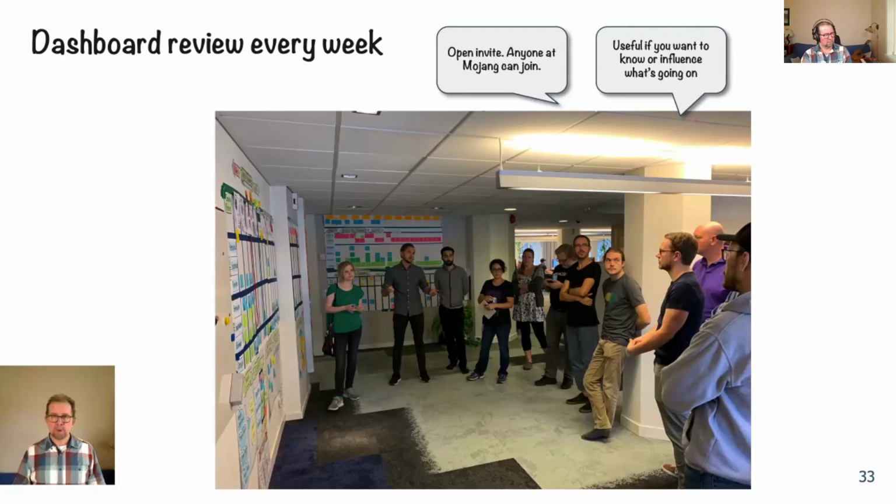And that's when we kind of go through what's going on, right? Is this view correct? Are there any problems people are having? Anybody waiting for someone else? Do we have any major decisions or pivots we need to make? So it's a really important meeting, and it happens every week, so we get a fairly good pulse, so to speak.